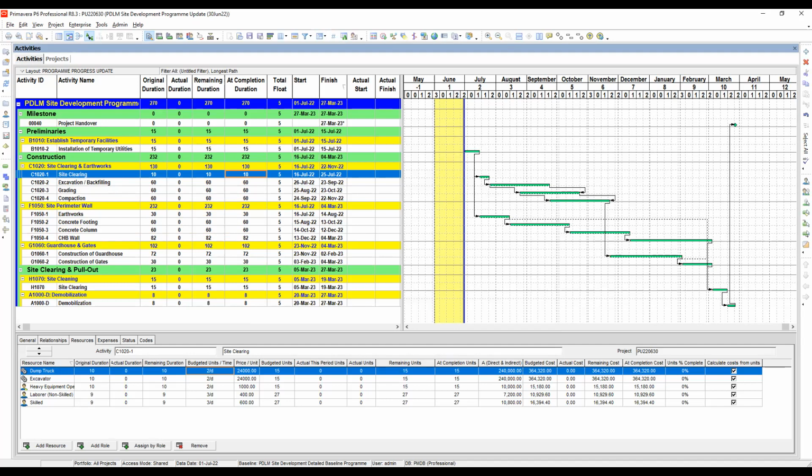So let's understand first what is period performance. Store period performance is the method of recording actuals, earned, and planned values for every selected financial period to be able to track past period values and analyze future performance trends. Okay, so before that, if you can remember, we have our predefined financial periods under the admin and then financial periods.